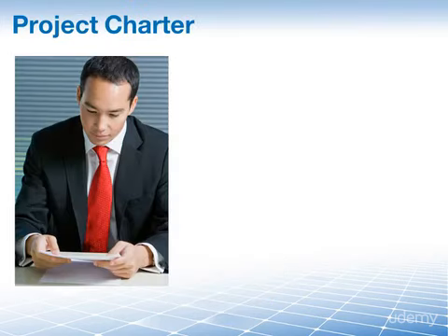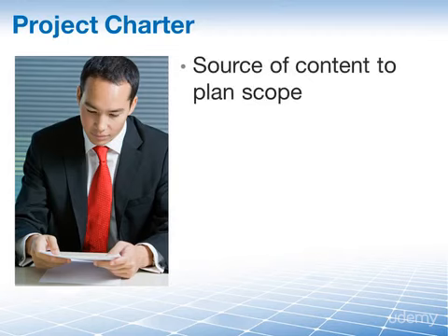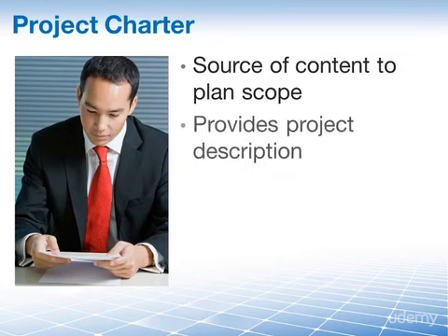The project charter is going to be your key input in developing the scope management plan. The project charter was created during the initiation phase of the project and provides several key elements to us here. It is a source for much of the content that goes into creating our scope management plan. The project charter provides a high-level description of what the project is all about.